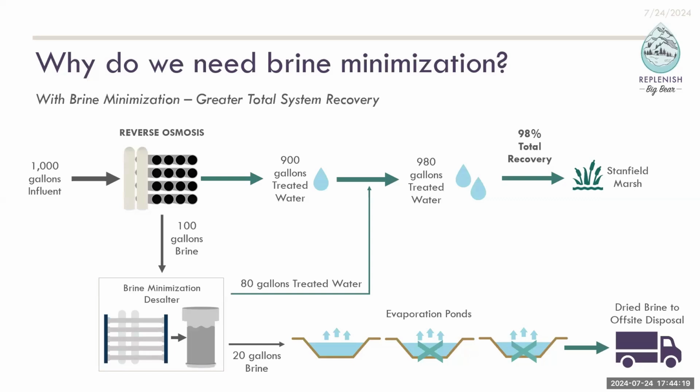Basically, the one we piloted was very effective. It works. We think there might be better options, so we're looking into that. If those options that we think might be better don't pan out, then we can also go back to the one that we piloted because we did prove that it works. So that's something that we'll be evaluating throughout the next few months. And that determination will be made and documented in the PDR, which will be completed in the fall, and we'll present that to you at that time.